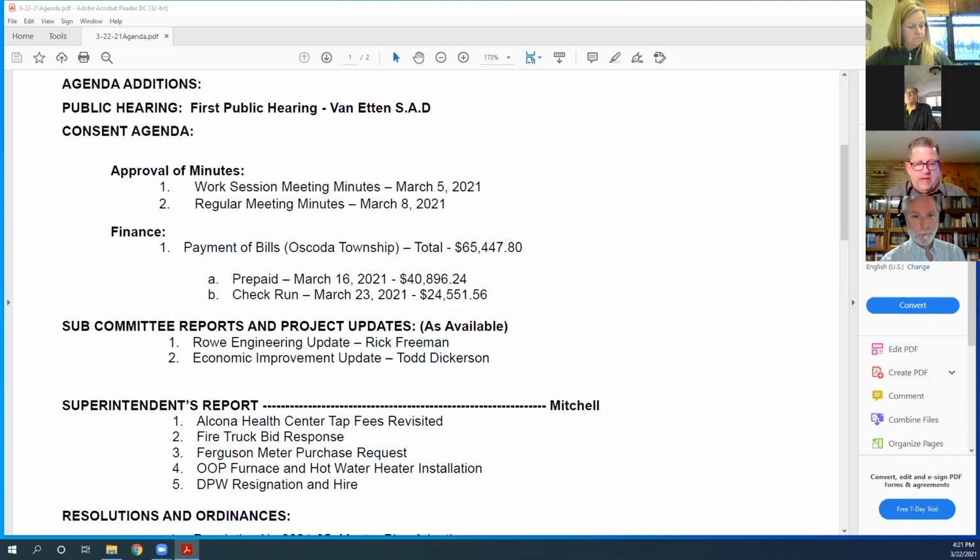Old Orchard Campground, the public dock erosion project that was awarded at the end of February. We're finalizing the contract documents with John Henry, breaking it into those 2 phases that we had talked about. Once we have that done, we'll get that over to Mitch and the attorneys for their review and execution. John Henry is not sitting back waiting for that. He has already ordered, and I believe the steel sheet piling has been delivered to the site. A week or 2 ago, I was coordinating with him and got him in touch with Gary and Al out at the park to get access so that steel sheet piling could be delivered. With the weather changing like it is, we should start seeing some activity out there shortly.